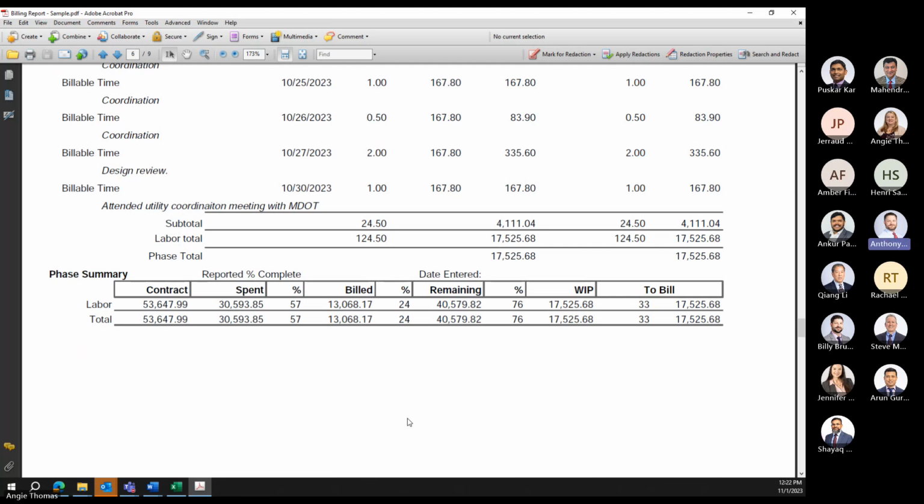Quite often, if you take a look at some of the different projects, one phase will be significantly over budget, and then the next corresponding phase will be considerably under budget, and the whole thing is tracking okay, but it's just not being looked at regularly to make that adjustment to make everything track on the same line. So these are some of the things that could slightly improve the process and make it a little more efficient.